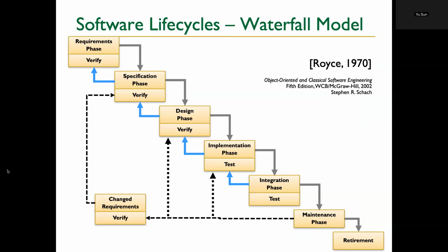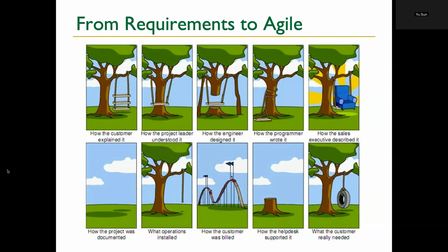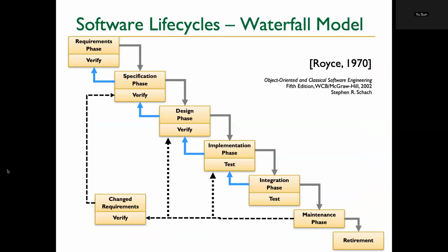Exactly. So that means we bring this part here earlier. Okay, I have 12 months. I can't afford for you to tell me this in month 10. Well, I get you to tell me this in month 1. It shares a similar idea to asking you a little bit early. But this time, I'm not just asking about the design. I want you to see the actual final product, the running prototype, the running code. Now you tell me if that's right or wrong. If you can tell me that in month one, that's fine. I'm going to redo it. It's not a huge issue.